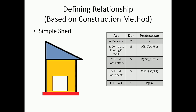The question is how can we do this - how do we represent these activities in a precedence diagram so that we will be able to represent what is actually happening on the construction method. The construction method becomes extremely important. If you are using prefab, the relationships might be totally different. It is extremely important that you look at the method and understand it properly before you start putting relationships representing what is going to happen on site.